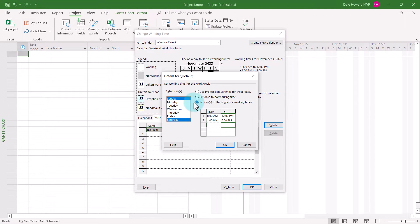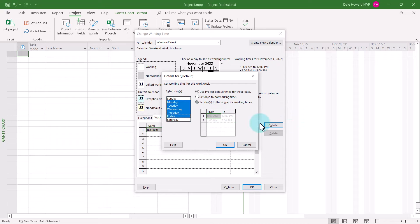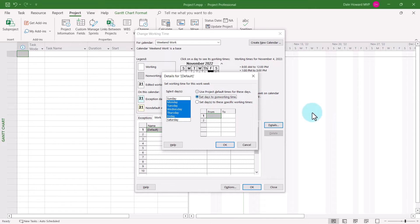The other days, Monday through Friday, need to be set to non-working time. So I'll select those days and choose the second option, set days to non-working time.